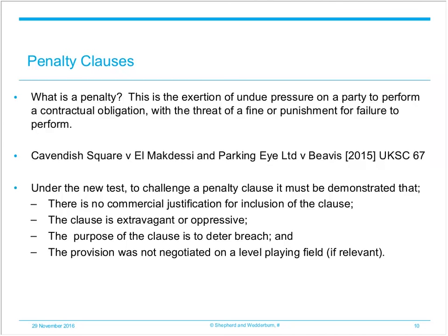So under this new test, in order for that challenge to be successful, it must be demonstrated that, firstly, there is no commercial justification for inclusion of the liquidated damages clause. Secondly, the clause is extravagant or oppressive. Thirdly, its primary purpose is to deter breach rather than to compensate for loss. And fourthly, and this consideration is only sometimes relevant, whether or not the provision was negotiated on a level playing field.